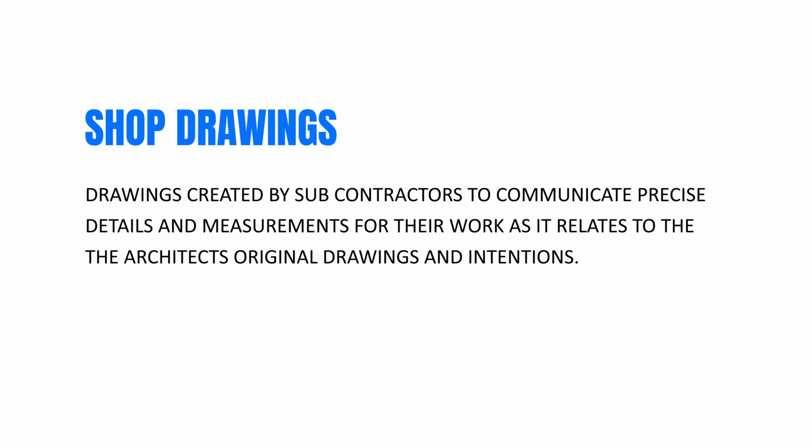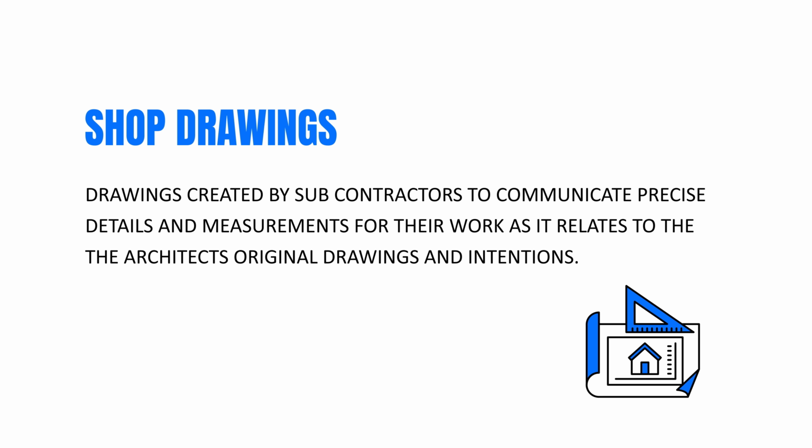My understanding of shop drawings is that they fill the gap between where the designers of record would stop their detail of any given construction component, and where the installers would then draw graphically how they would finish out that design to completion, including all the connection points and routing and the minor detail that the designers of record will not include in their original drawings. How far off am I?